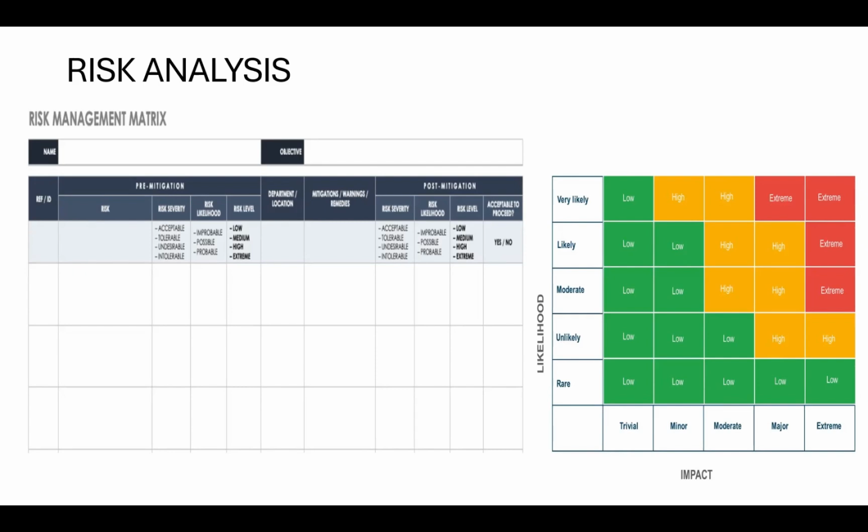Yes, risk managers. I would say non-disclosure agreements with third-party companies. Thank you very much. We sign an agreement. We train the people. We allow them to read our data breach policy, and they will agree to it and sign it, so that in case they go outside of it... So with that mitigation in place, the severity, if it was undesirable, now becomes acceptable. It is now low. It is now reduced.